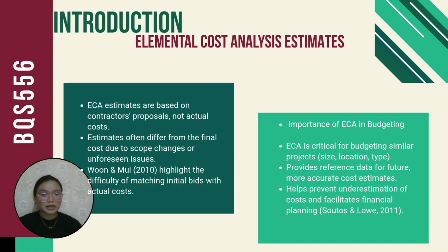Further, it is important in budgeting. ECA is critical for budgeting similar projects in terms of size, location, and type. It provides reference data for the future, for more accurate cost estimates. Also, it helps prevent the underestimation of cost and facilitates financial planning.